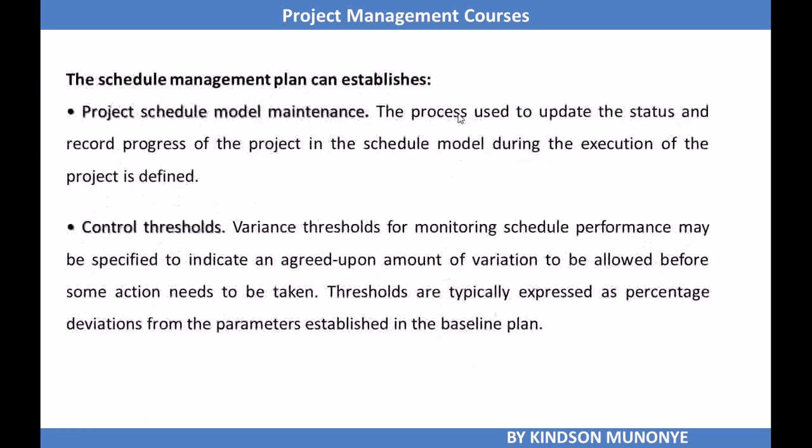Control thresholds will also be established by the schedule management plan, and that has to do with variance thresholds for monitoring schedule performance, which may be specified to indicate an agreed upon amount of variation to be allowed before some action needs to be taken.